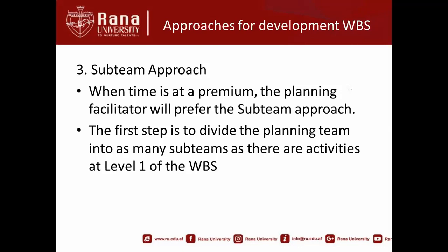For example, currently you have one team for electrical work, but you want to speed up the activities, so this one team will be divided into two. When you have two teams, the things will be finished earlier as compared to a single team working on the tasks.